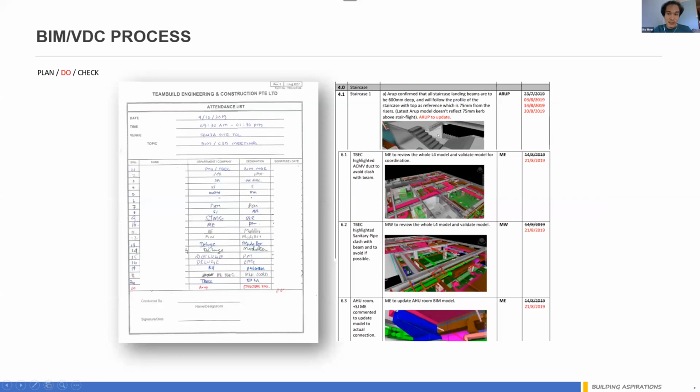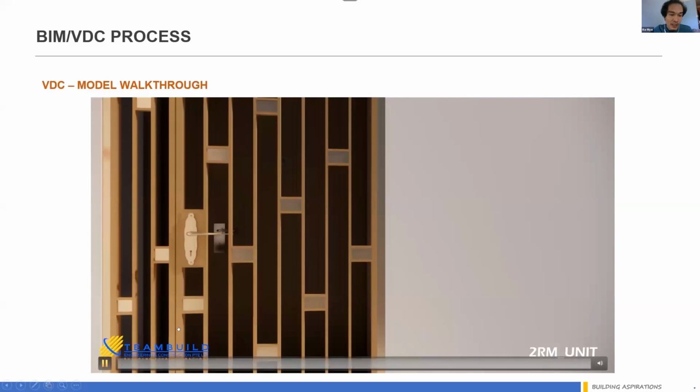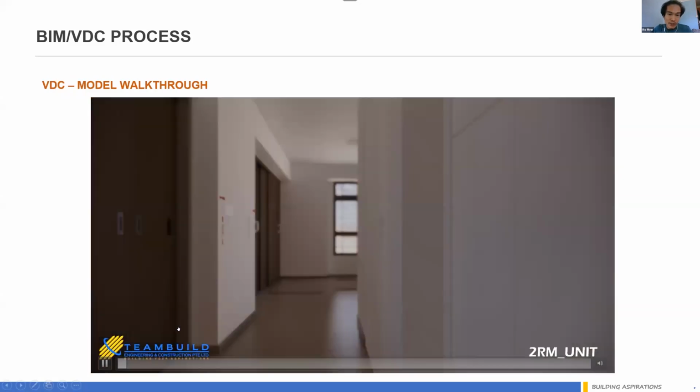So just now, that was for the Xinjiang project, and this is for the unit model of the HDB project. You can see the IPS model is shared to us. What we basically do is bring in the modules, basically like the actual building. We need to virtualize the modules, and then finish the architecture finishing and electrical. So we include all those elements, combine and integrate them, and see what the clash detection is. This is an example of a virtual walkthrough model that we're doing.